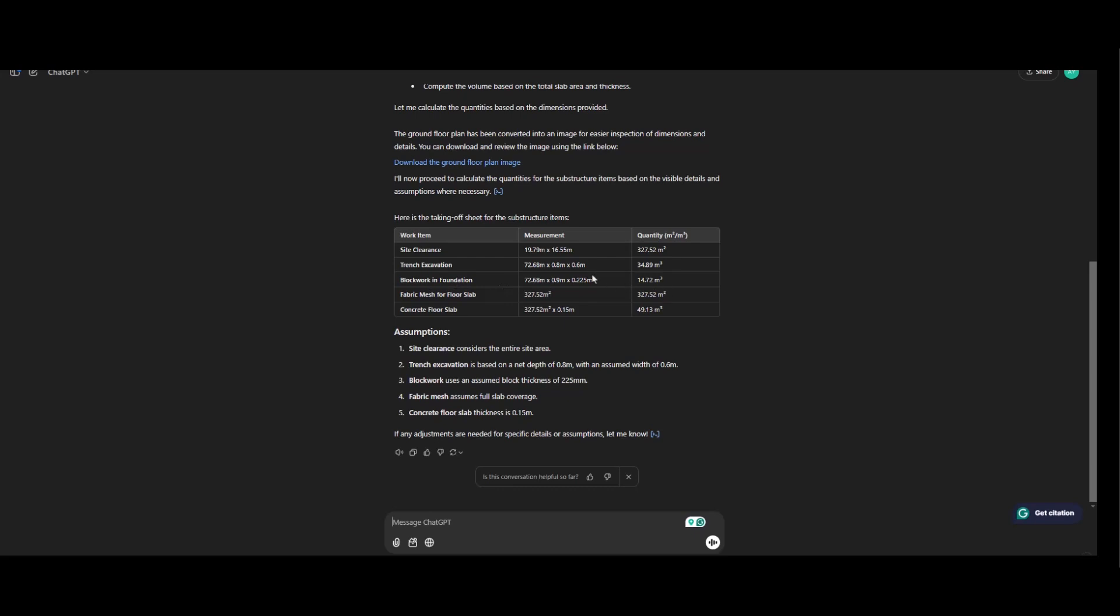So this is one of the problems we have with AI. Block working foundation is measured in meters square, but this is measured in meter cube. That's one of the problems. Fabric mesh, this is it and is measured in meter square. So same thing as the site clearance. Concrete floor slab, the area multiplied by the thickness. So let's check the assumptions.